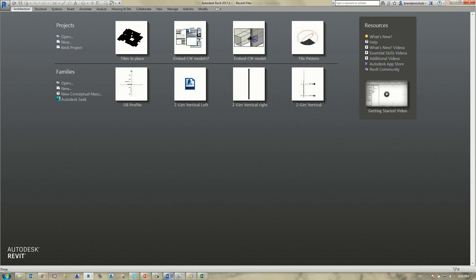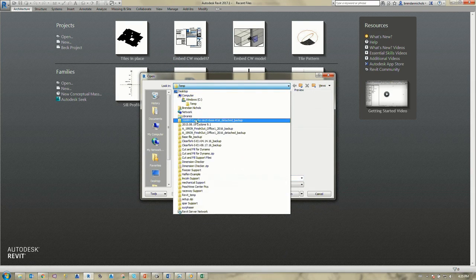It kind of depends. This is really to visualize your data. I'm not sure what kind of visualization you'd want to be doing from a road. You want to simulate the progress. Yeah, you want to see, okay, I should be here, and I'm here. Oh, yeah, this actually could be really good for that. If you go out and survey the new data every month, you could bring it into Dynamo and just set one color for each month. And then you could keep the same file, open Dynamo every month, bring a new list in, color it, etc. You need some tweaking, obviously, but the concept is very doable.